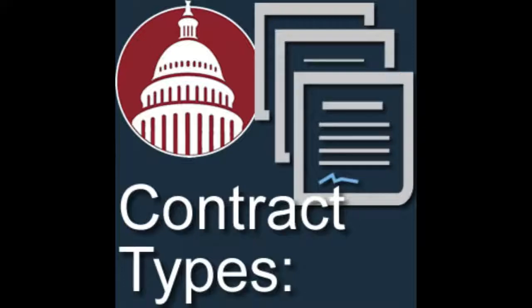So you get into this discussion of, okay, well, how exactly do we define those costs? And that's what you're talking about as far as the cost reimbursable process has to show: if we're going to reimburse you for these costs, we have to know they actually happened, number one. Number two, we have to know that they're actually allowable.